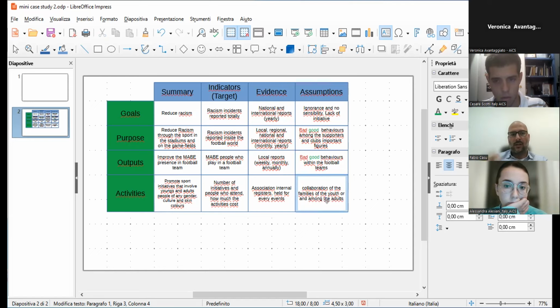But when you have a project, here you have a group of activities. In project management, you will have to write down what is called the WBS. It means work breakdown structure, that is, the list of the detailed activities that you are going to do. So now we have this group of activities, it's right. After that, you write down the indicators and targets, go back to the activities and try to list detailed activities.